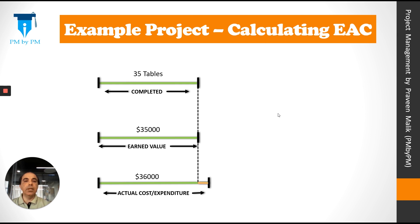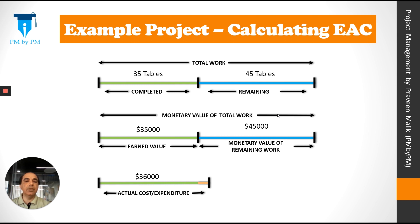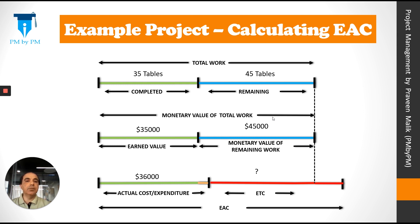We have spent more than the budgeted amount. Now we have to build 45 more tables to complete the project scope; the monetary value for these 45 tables is $45,000, and our original budget was $80,000. We need to spend some more money to complete the remaining work, expressed as ETC. ETC could be less than, equal to, or more than $45,000. Most likely we will spend more than $45,000 since we are not making good progress, so our EAC is likely to be more than $80,000.